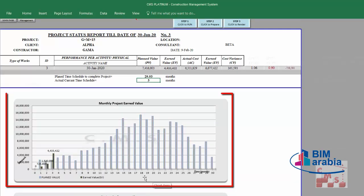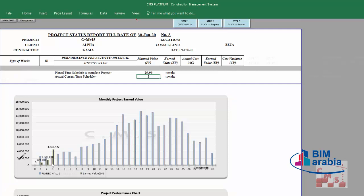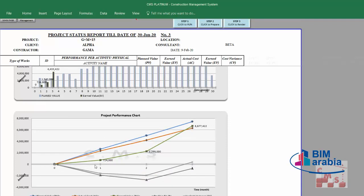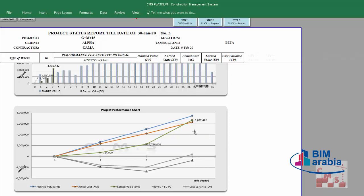CMS provides the required charts: monthly project earned value, a comparison between planned value and earned value in bar charts showing what is planned versus actual each month, and an overall performance chart. This chart shows cumulative results: planned values in the blue line, actual cost in the orange line, and earned value showing how it's increasing. The schedule variance is earned value minus planned value, and the cost variance graph shows exactly how each metric is moving every month. This graph is very important — it shows all the history and current status of the project.